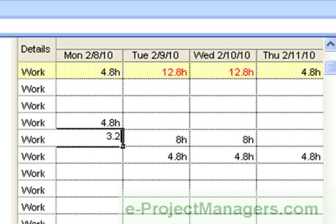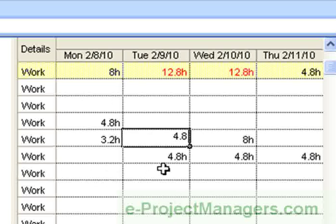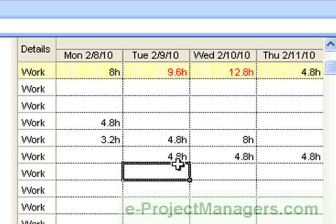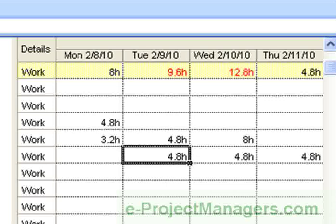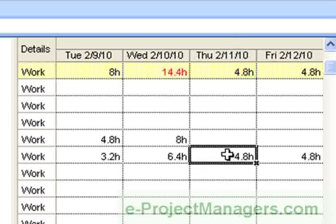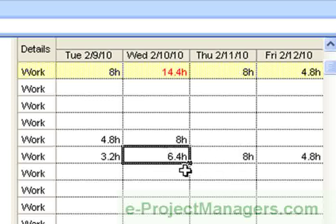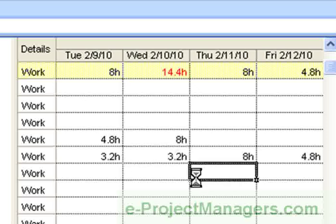I walk you through how to adjust the over-allocated time so that if the resource normal workday is eight hours, you'll be able to manually adjust the schedule to reflect a proper work schedule of eight hours. And what I do in this video tutorial is I walk you through step-by-step how to do this manually, as you see here in the background.